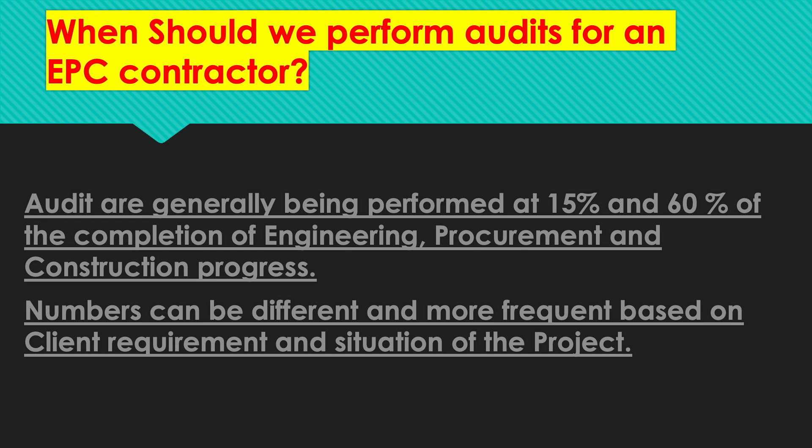That means 15% of engineering, 15% of procurement, and 15% of construction progress, and then 60% of each. There should be a separate audit for each department. Numbers can be different — someone may do it at 20% or 75% — it should be decided by the client and the project contract document at the beginning of the project.